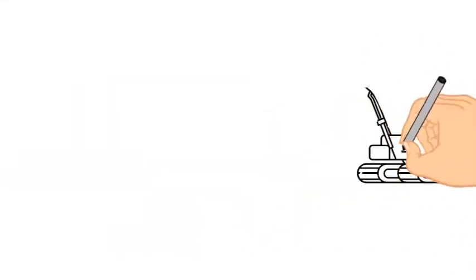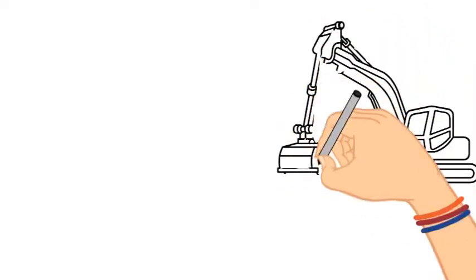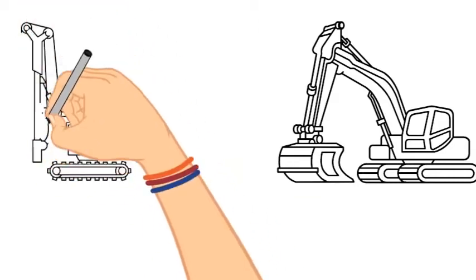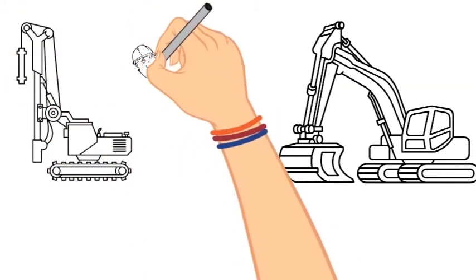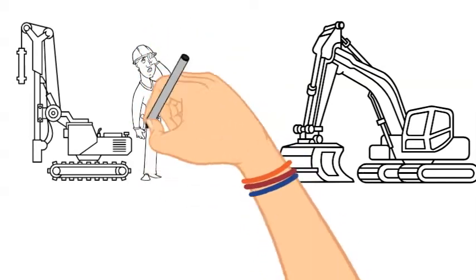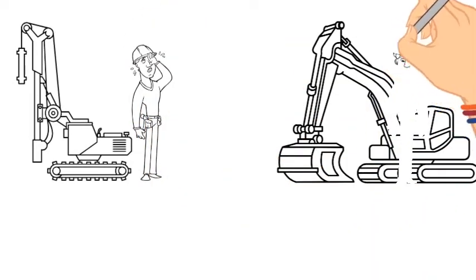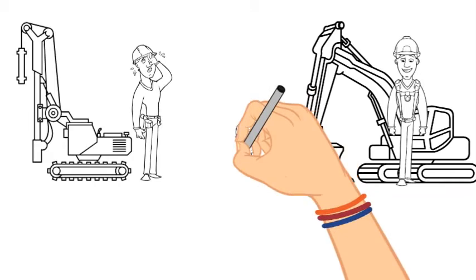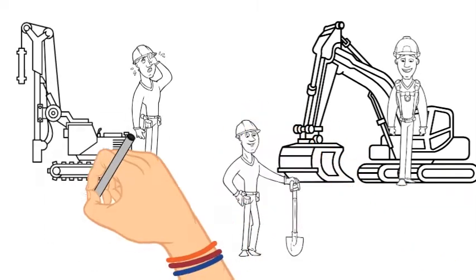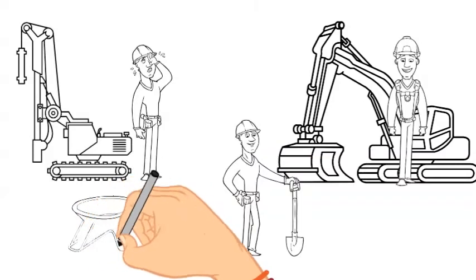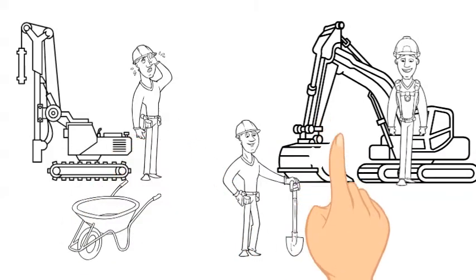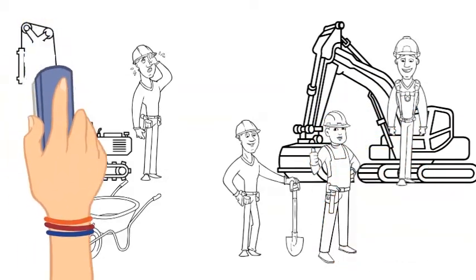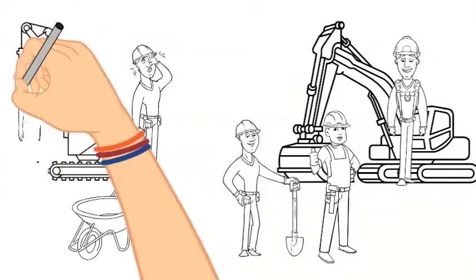So now we get to the site team in the construction phase. Now remember, it's not materials that we need turning up straight away, it's generally machinery. This is going to be coordinated on site by the site manager. The safety manager is going to make sure that everything happens safely. He'll make sure that the risk assessment put in place by the design team is followed and hold toolbox talks so these site operatives and skilled workers can work according to the plan, whilst the site manager is making sure everything's going on schedule. Every now and again, the architect's going to come and visit and make sure that the site's fulfilling the client's vision as well.